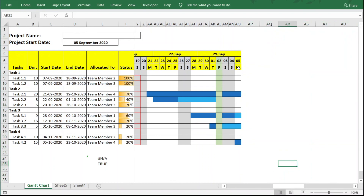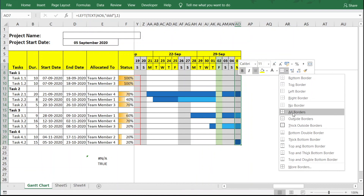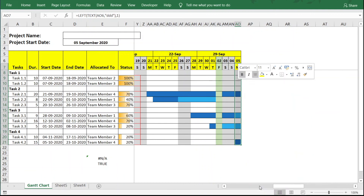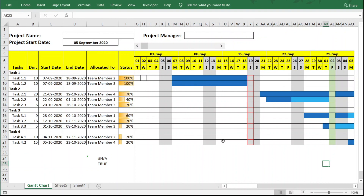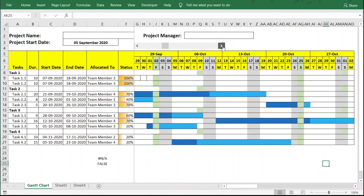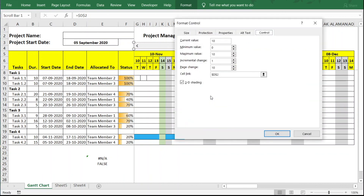Since we now have the scroll bar, we don't need such a long timeline. We reduce it to five weeks (columns for weeks 1–5) and remove the extra weeks. We add a right border to mark the end of the visible timeline. The scroll bar still works correctly, allowing up to 10 weekly moves. The maximum value in Format Control can be increased if the project extends further.